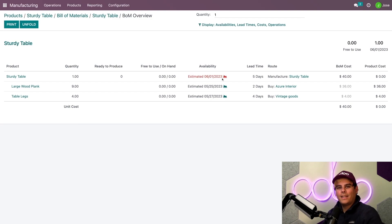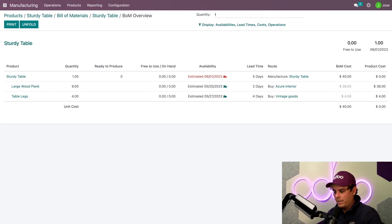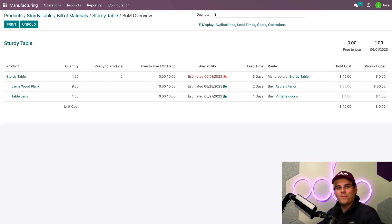And it tells us the exact estimated date that we anticipate finishing manufacturing the table. So based on the lead times set previously, the earliest date we'll have the finished product is in nine days. And that's because even if we ordered the components today, the large wood plank comes in two days and the table legs come in four days. The component with the longest lead time is used to calculate the days to prepare manufacturing order.